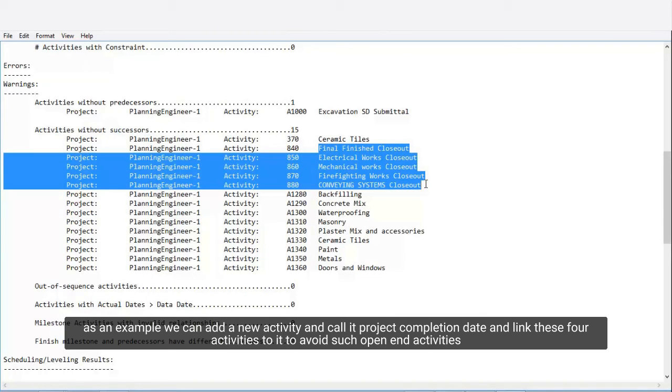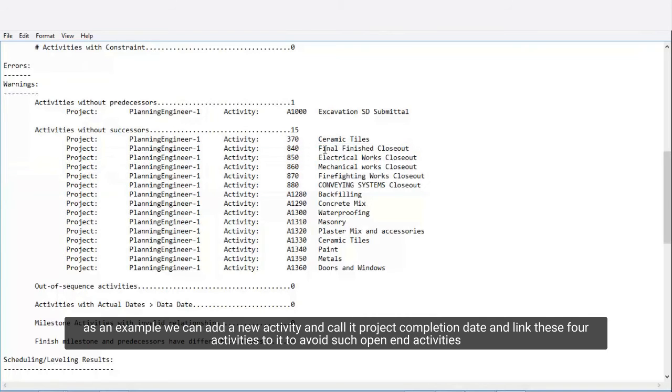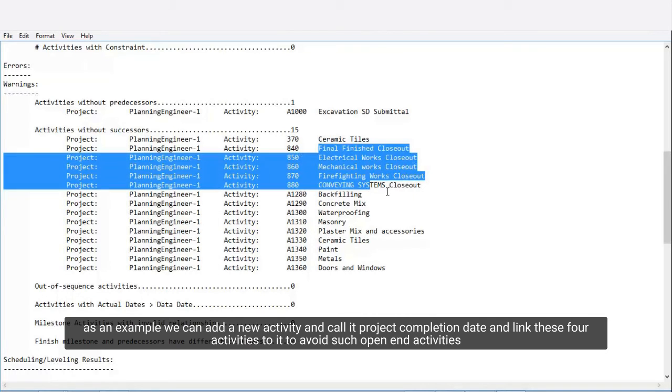As an example, we can add a new activity and call it Project Completion Date and link these four activities to it to avoid such open-end activities.